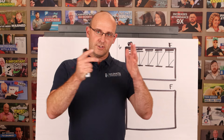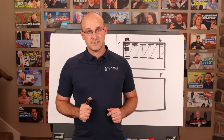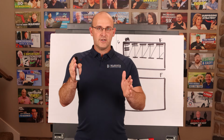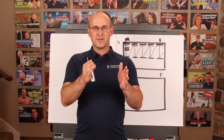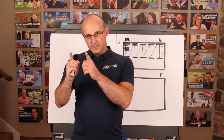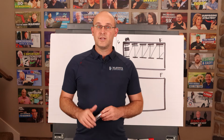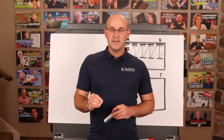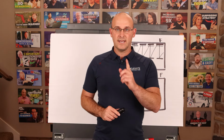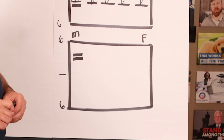That's where you're going to look at your overall macro level TAC plan and your procurement log or your procurement system. And you're going to make sure that your overall project is doing well, that your current data date is accurate, the materials are coming properly in the next 120 days, that you're meeting production, that you still have plenty of buffers, and that your overall schedule is accurate. And that your procurement log is on track and on target to bring materials out according to that plan. That is key. So that's called your strategic planning and procurement meeting.